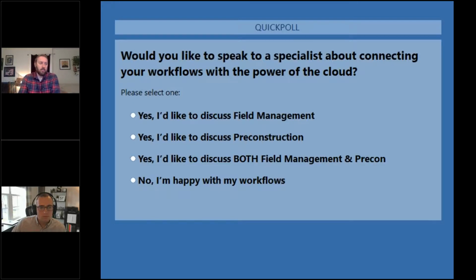Yeah, actually, one of those stats that I talked about earlier, where folks are seeing a 20 to 30% reduction in time in pre-construction, was from an organization that was using Revit Cloud Worksharing to work in one place, the designers were, and then they would immediately pop over to coordination to run a clash detection on their specific models that they're trying to design, and then jump back over to Revit to quickly remedy that.